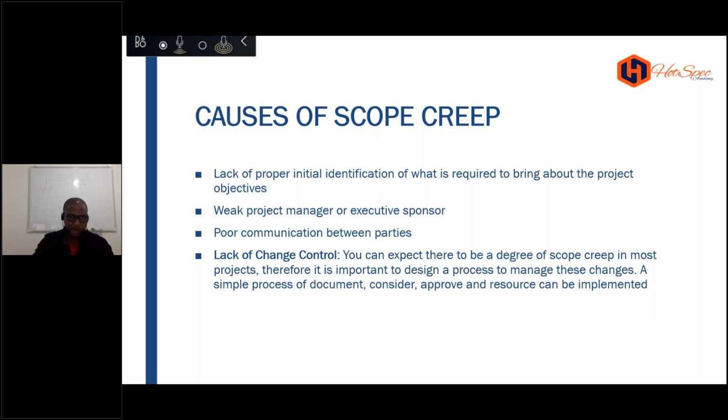So the PMO, the PSO, they return all the feedback. So I always give them the document, guys. I'm sending the document, send it to everybody on the review list. So they identify the people that they send it to. They then set a target. It's prioritized. We only circulate for 7 days max. So it's got to be returned within 7 days. And they begin to chase it for you.